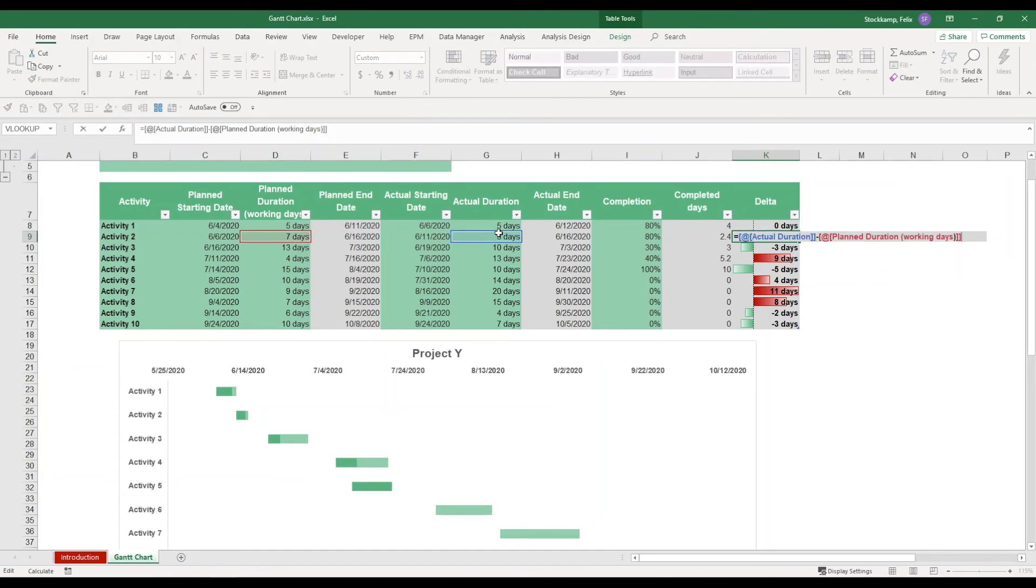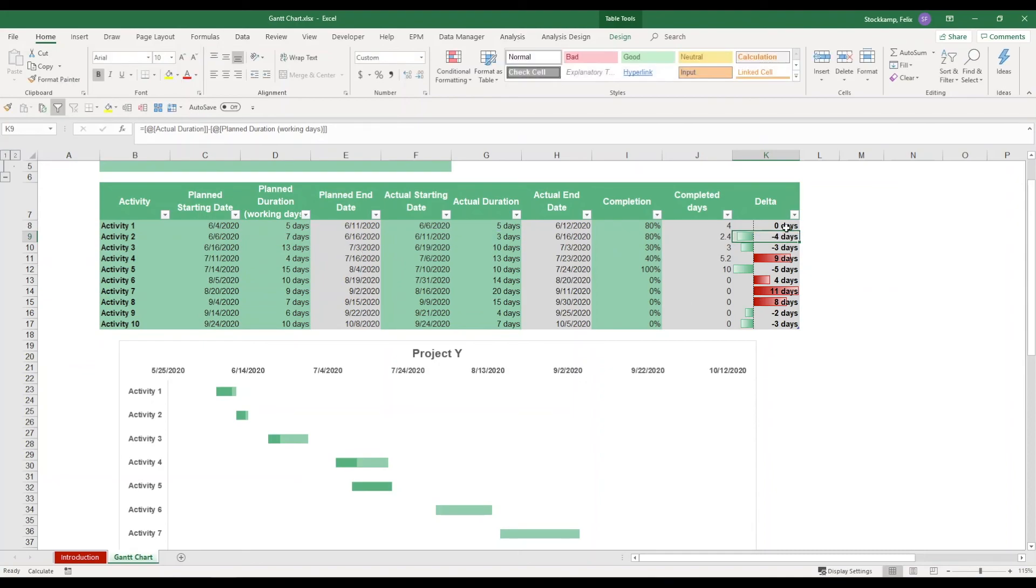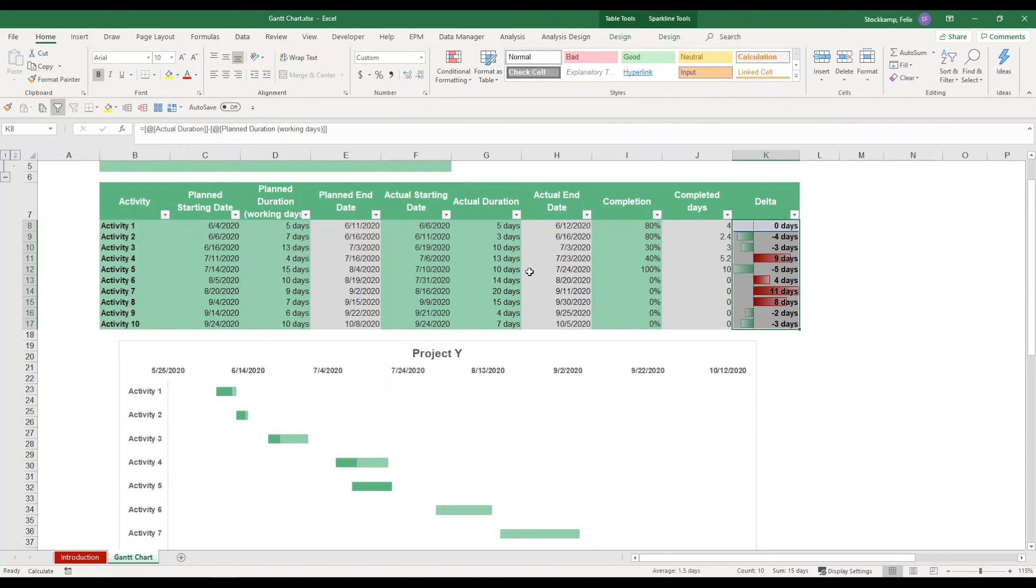It's a simple formula just deducting actual duration minus the planned duration, but it also gives you the visualization right here in this column. So I hope that you'll be using the Gantt chart because it's a super powerful tool to track the performance of individual activities and to make sure that you're still on track.